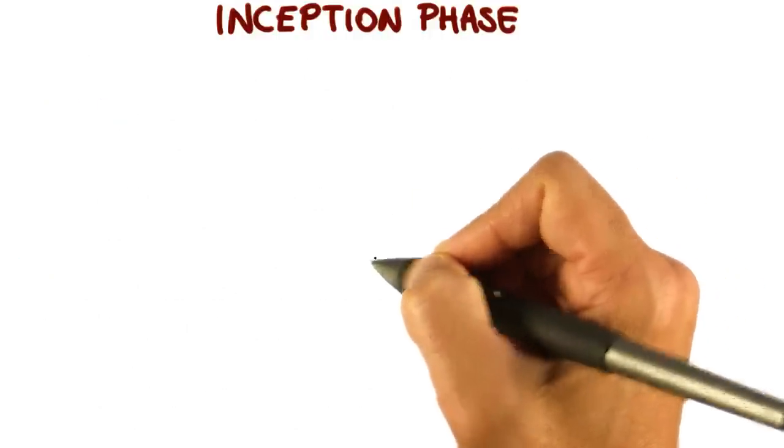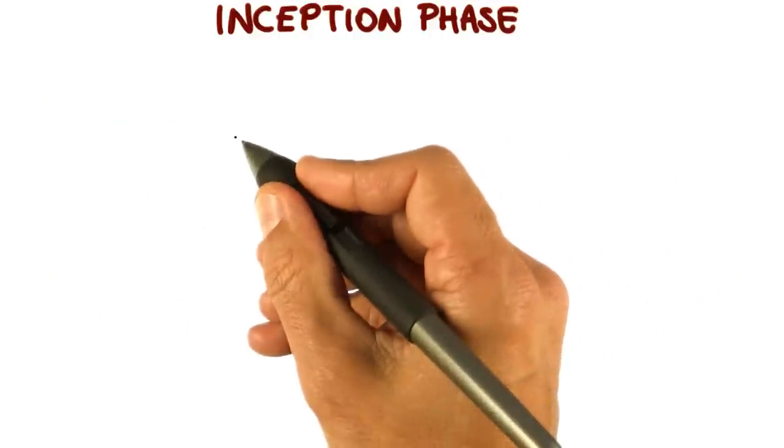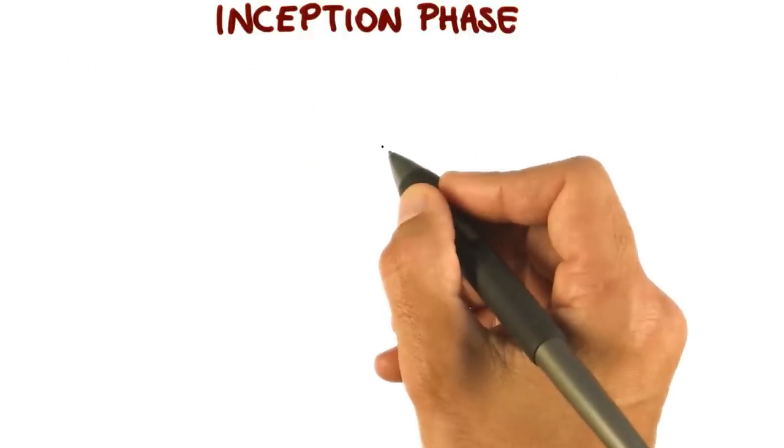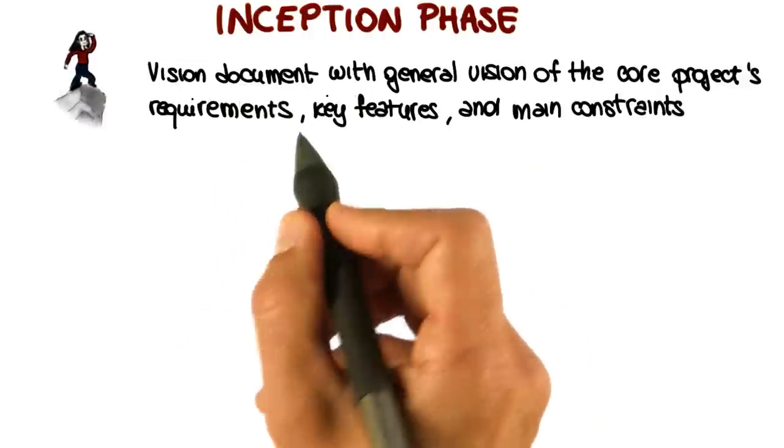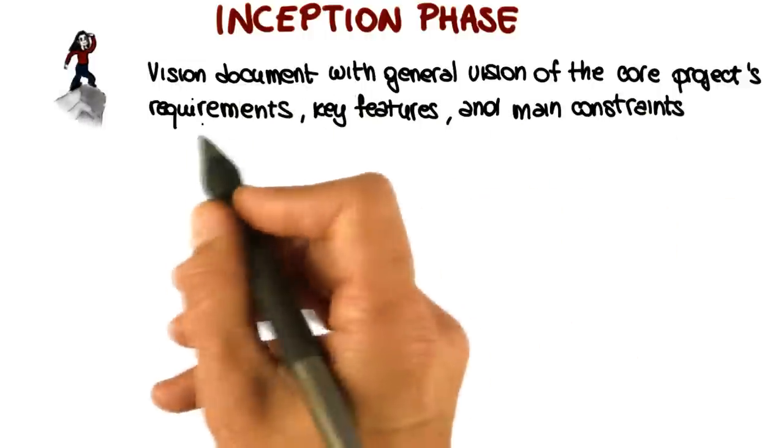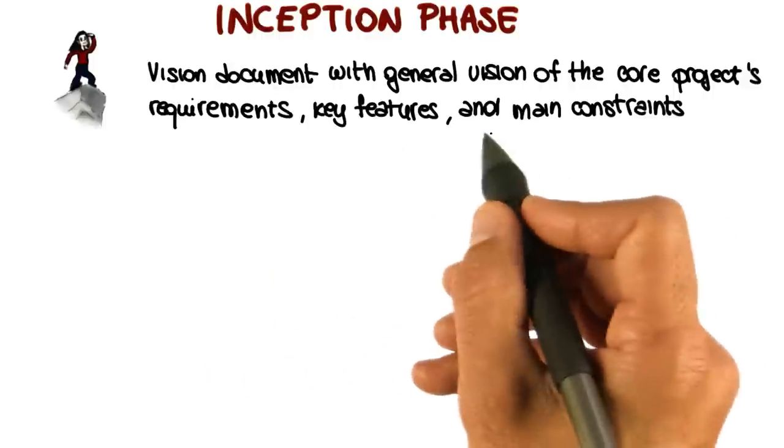Specifically, the inception phase generates several deliverables. It is very important that you pay attention so that you understand what these deliverables are. Starting from the first one, which is the vision document. This is a document that provides a general vision of the core project's requirements, key features, and main constraints.